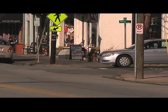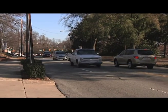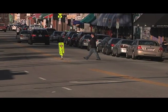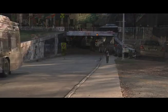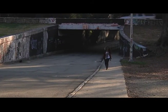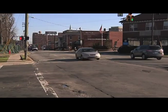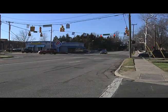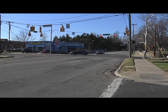Okay. Well, is West Main Street the only area that's going to receive new water lines, or will other streets be affected as well? Sure. Most of the project is along West Main, but there are several interconnections that we will have to make to backfeed the grid. That's 9th Street, Iredell, Campus Drive, and Buchanan Peabody intersection. Most of the work will be done during the daylight hours from about 7 in the morning till 6 in the evening. Some weekend work or even nighttime work at key intersections, though, will be done. If there are any detours necessary, they will be posted.